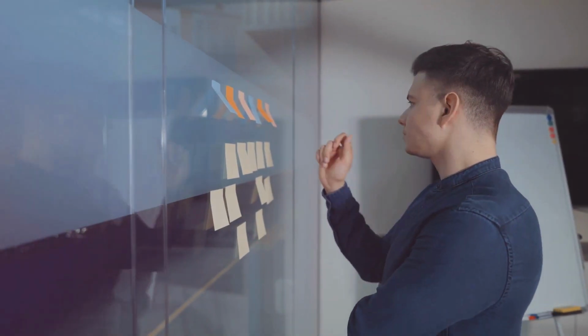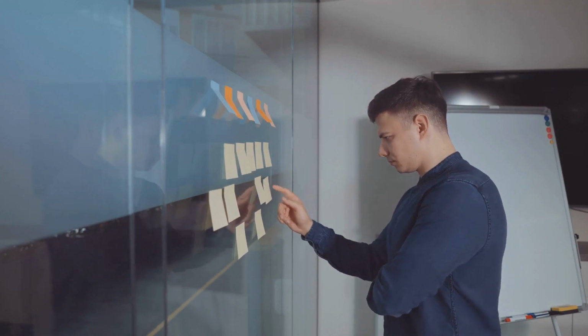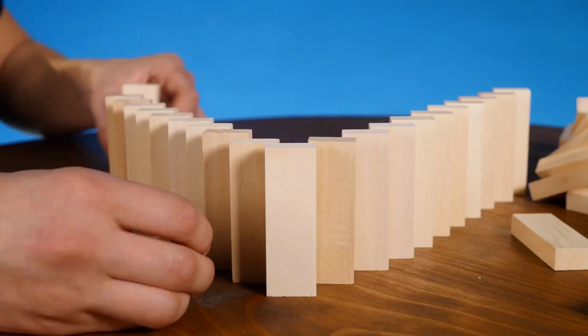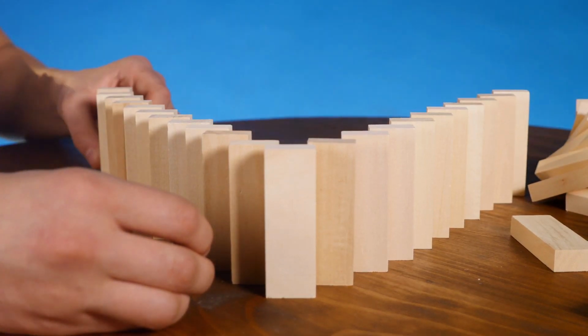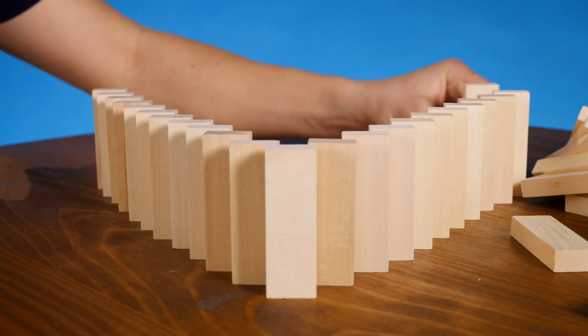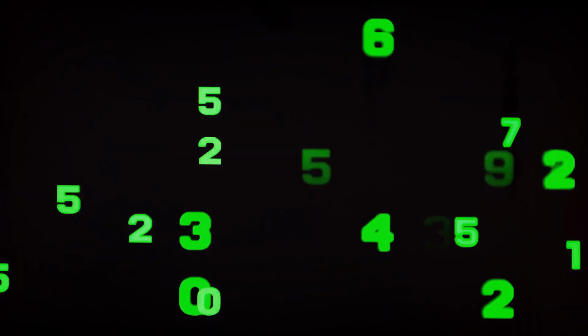Sequential logic is a system that requires all activities that logically precede a given activity to be complete before the given activity can start. In simpler terms, if you have a task B that follows task A, you can't start task B until task A is finished. It's like dominoes, the next one can't fall until the one before it does.